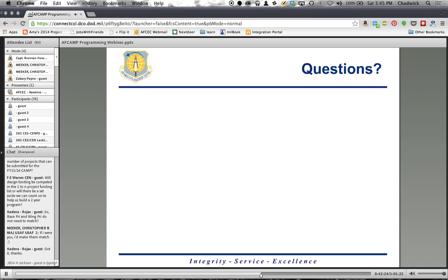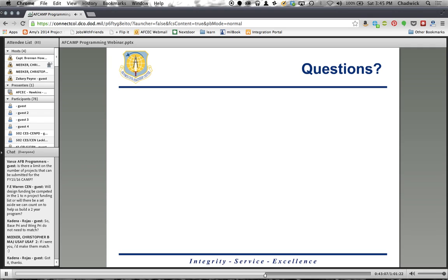Not necessarily. The long-term intent is to do a design-bid-build, theoretically to help us drive down costs and better establish estimates in terms of our construction. This year is going to be obviously an odd year since we don't have the FY15 list yet. So the intent of doing the early design pull is to get started on those FY15 construction projects now, so that we're ready to start construction in FY15. Once the IPLs are approved, we will be doing a similar process for all the FY16 construction projects and issuing ATA on those designs so hopefully we can pick them up with end of year fallout and get started on those designs so that we have all of FY15 to do those FY16 designs. Hopefully that answers that question.